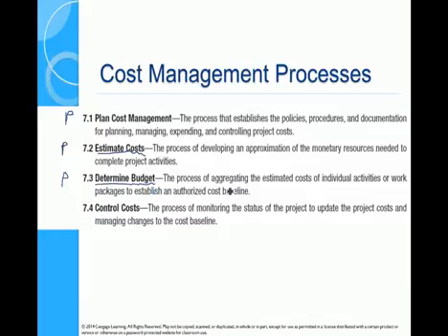Like scheduling, we finally authorise a cost baseline. Now, that's not just a total budget, that's actually how much money is spent on each activity. And because that's aligned with schedule, that means how much money is spent during each period. And because that's aligned with scope, that means how much money is spent on delivering every part of scope. And that's how we get this idea of cost controls, which are in monitoring and controlling.